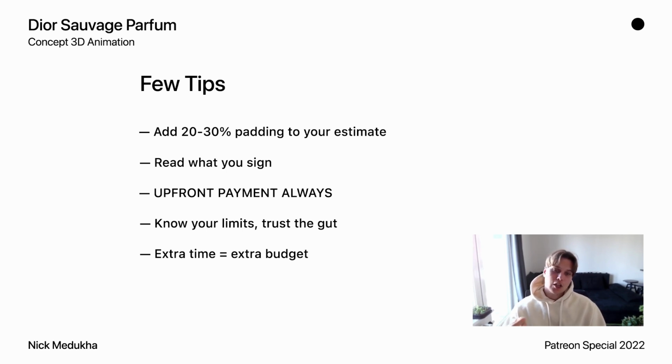If something changes and that is not because of your work, for example, a client sent you the wrong 3D model, or the client wants to introduce a few extra shots, it's all time, it's all work, so it's all money. I really remember myself when I was starting out and I was like, oh yeah, sure, I'll do anything extra because you are my third client in my lifetime and I will do everything.